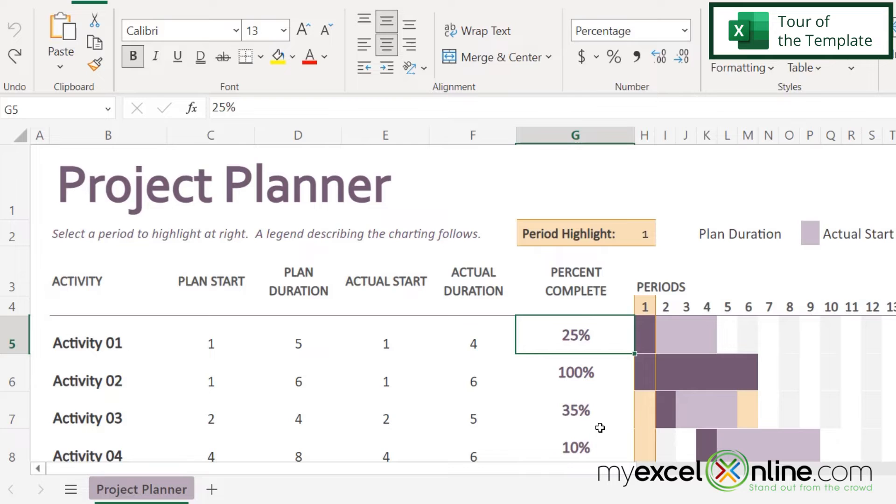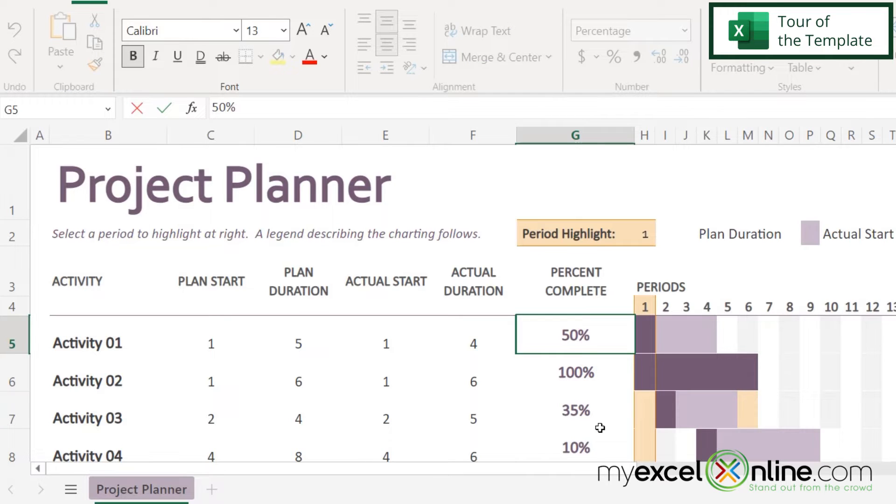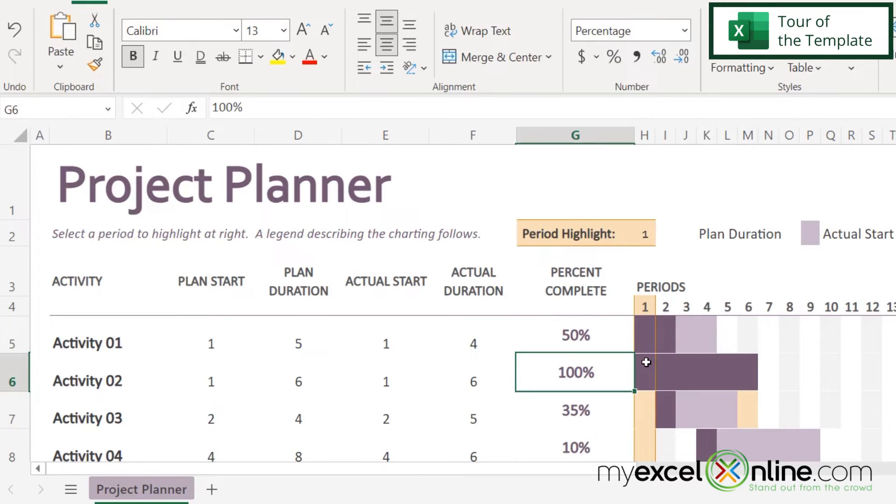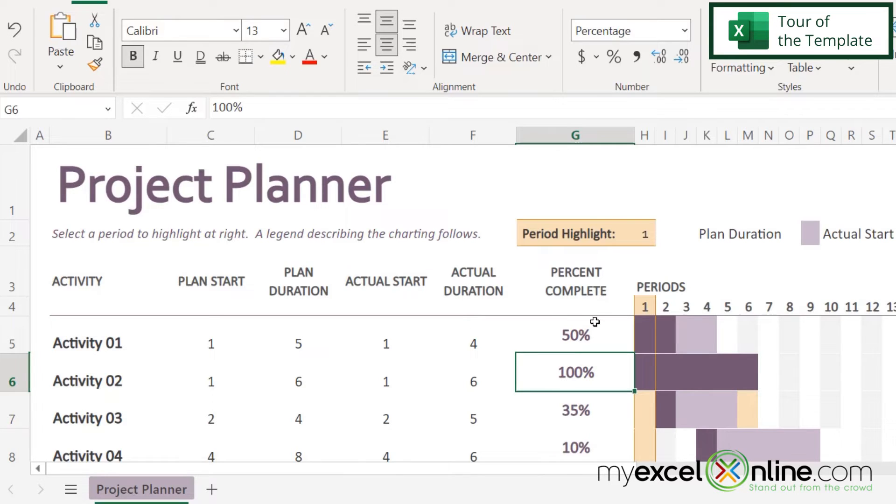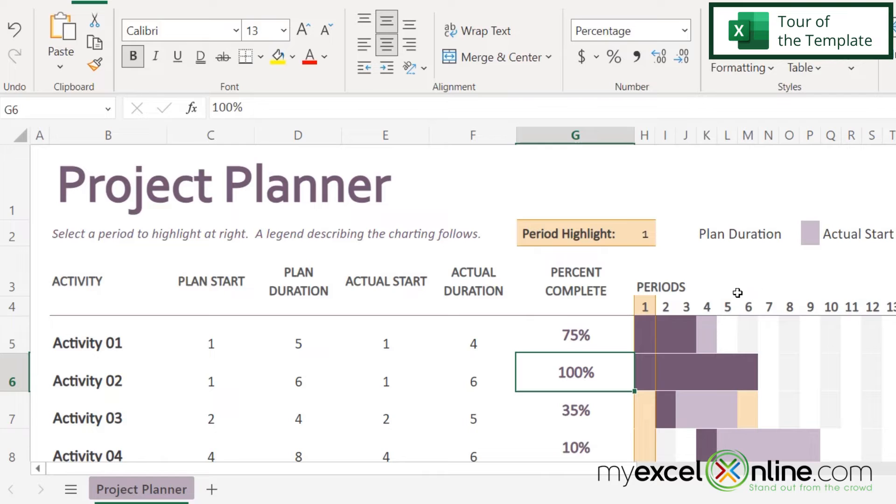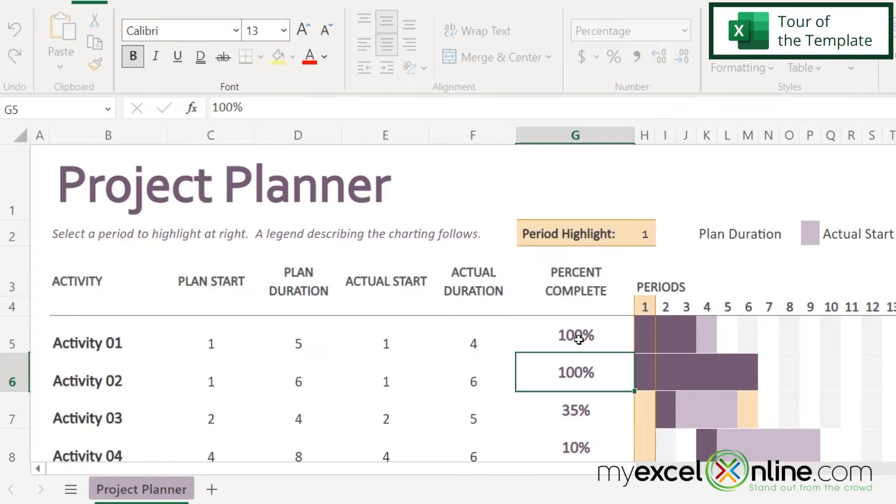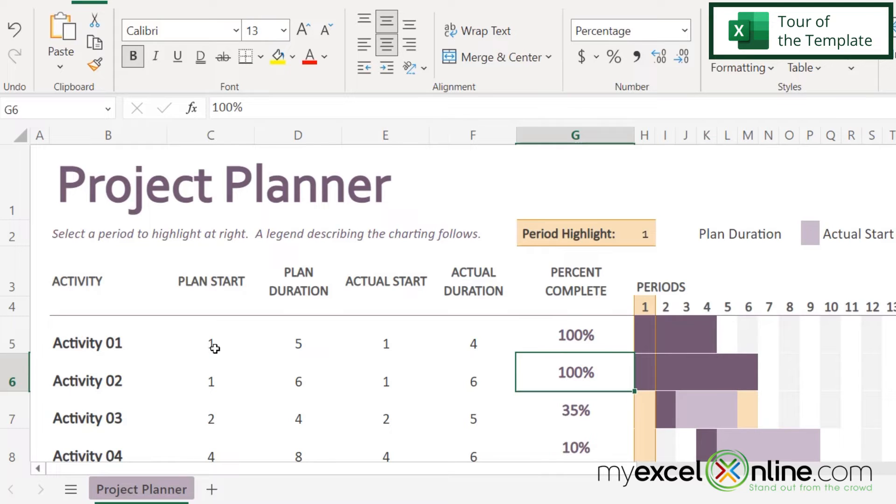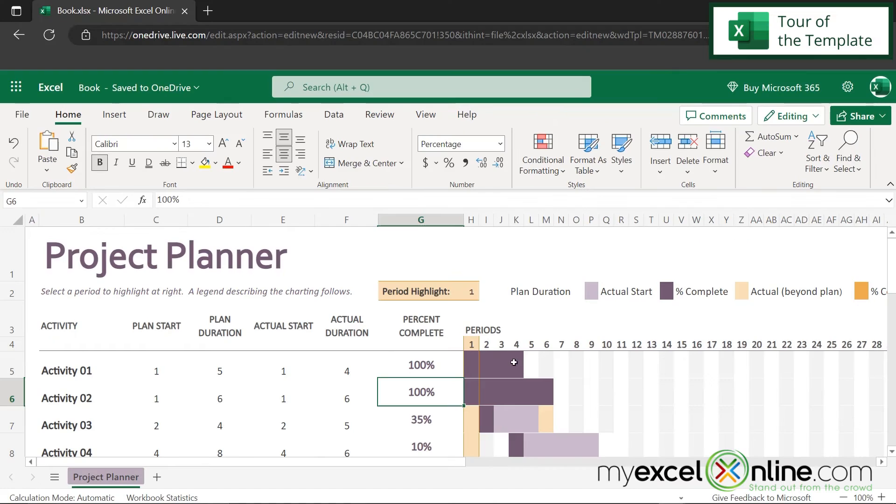So if I go over here to my percent complete, and I make that 50, you can see that I now have two days completed of my actual duration, because I'm 50% complete. So if I change this to 75, I will now see that it's three. And if I change this to 100, all four days have now been color coded. And I will see that this task is actually finished, just by quickly looking at this graph over here.